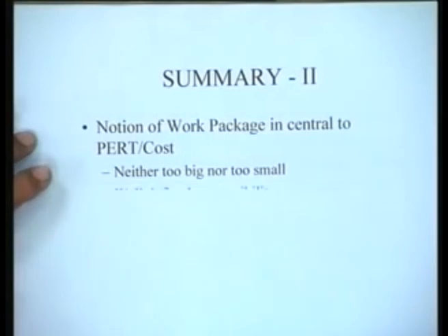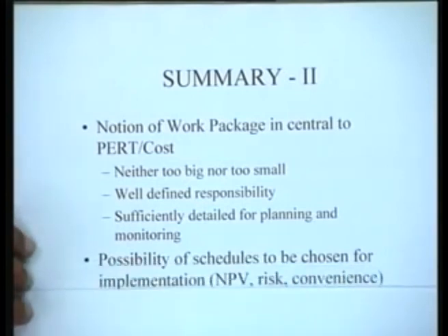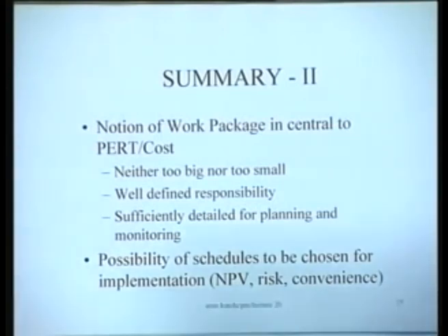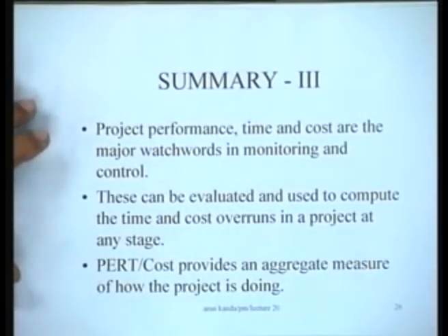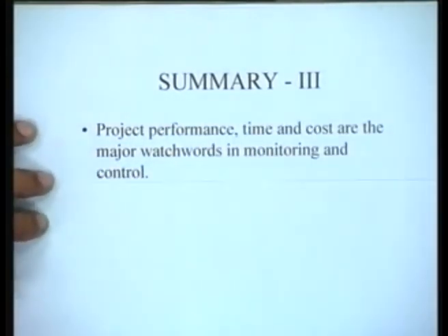Neither too big nor too small, well-defined responsibility, sufficiently detailed for planning and monitoring, and the possibility of schedules to be chosen for implementation. There is a large possibility of which schedule you choose. It has to be a trade-off between the net present worth, the risk, and the convenience that you take, whether you take an early start schedule or a late start schedule or whatever. And finally, project performance. Time and cost are the major watchwords in monitoring and control.